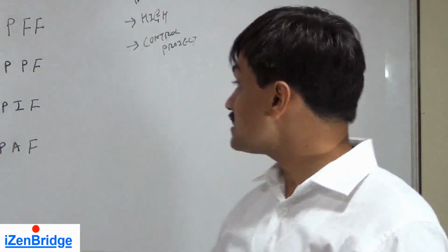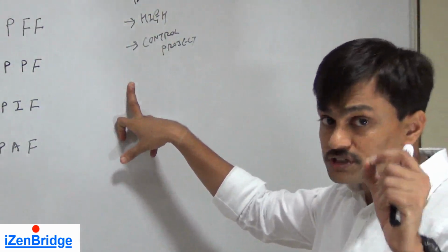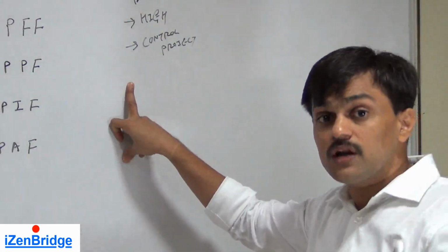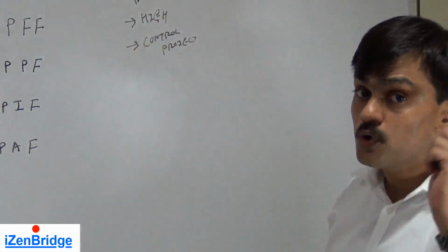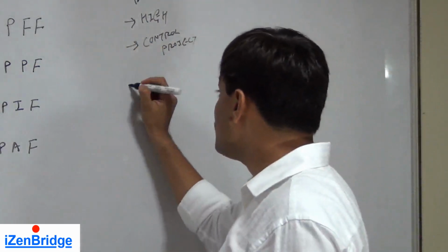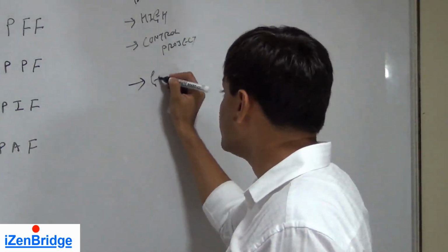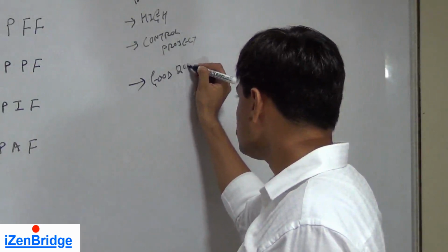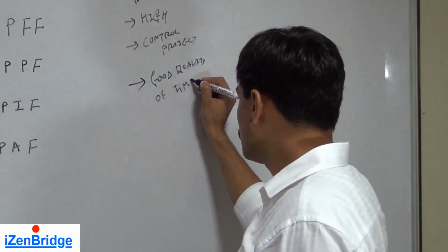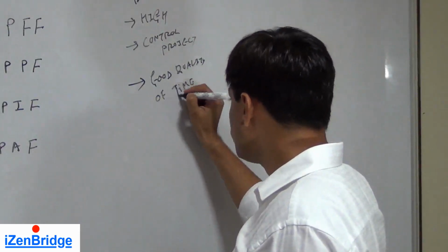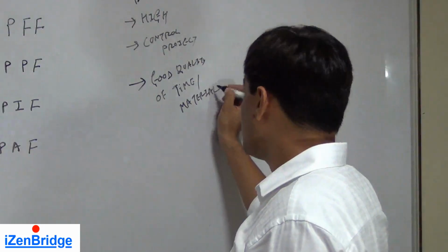Now the buyer has a responsibility to ensure that you get a good tester, because the quality may vary. Tester 1 may not be equal to tester 2. So in this case, the buyer has to ensure that the time and material which is coming with a fixed rate should be of good quality. Since the rate is fixed, the quality responsibility goes with the buyer.